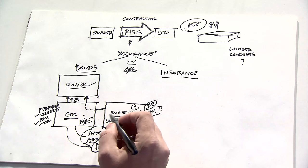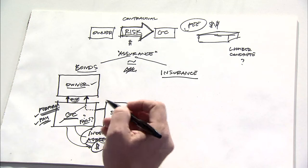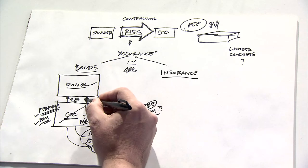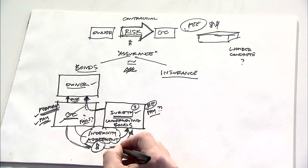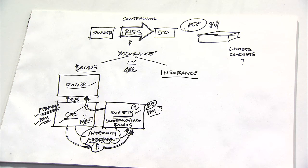And again, through the indemnity agreement, if the contractor did fail and the surety then had to make good on this obligation to perform and pay, then through the indemnity agreement, the contractor would agree to repay the surety.